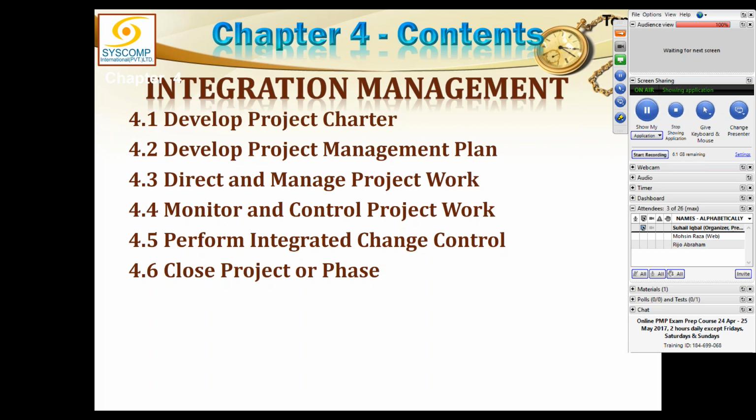So for all practical purposes, although it is not written in the PMBOK, the project board would be offered these change requests and they would actually give the decision which change request has been approved, which has been rejected, which have been pended, which have been suspended or whatever. So whatever treatment to the change request is to be meted, it would be through this process, perform integrated change control. And once a change request gets approved, this news is communicated back to execution.